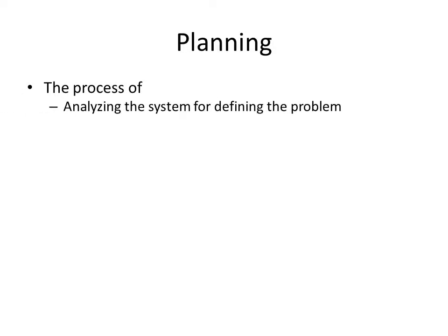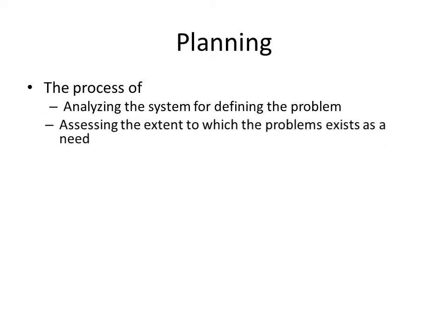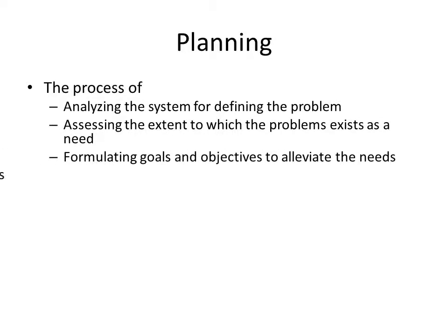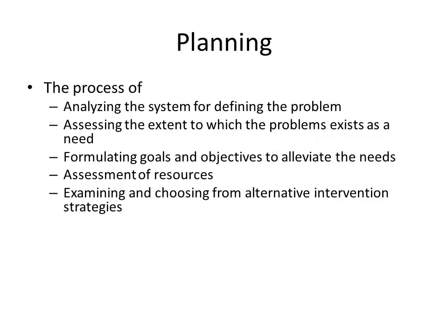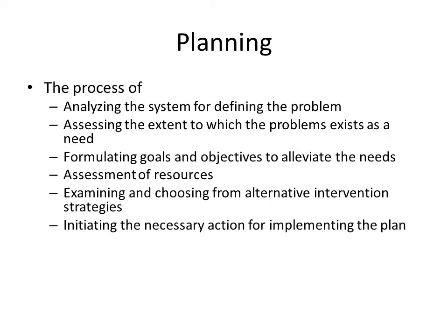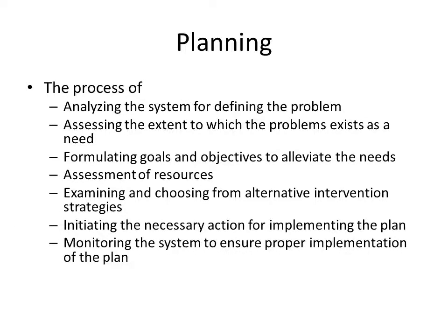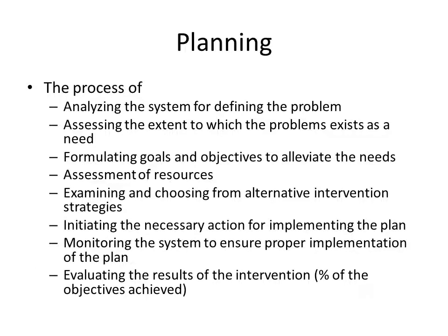Planning has been defined as a process of analyzing the problem as it exists currently and assessing the need for improvement, formulating goals and objectives, assessment of resources, and choosing from alternative intervention strategies to tackle the problem, initiating the necessary action, monitoring the action to ensure proper implementation, and finally evaluating the results of the intervention. Although this is the definition of planning, it actually is the enumeration of the steps in the process of planning for any purpose.